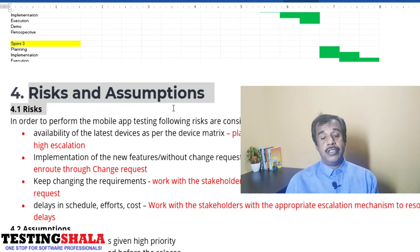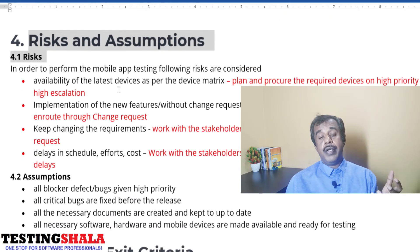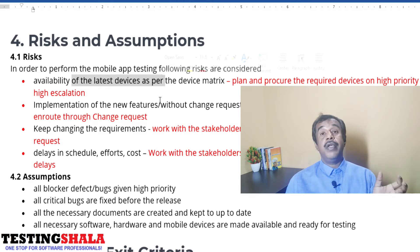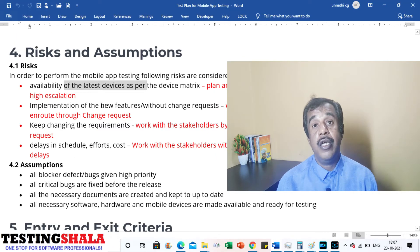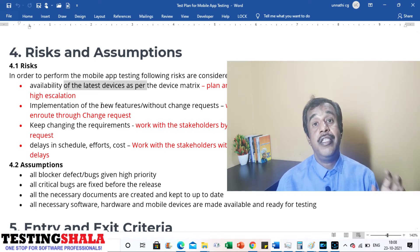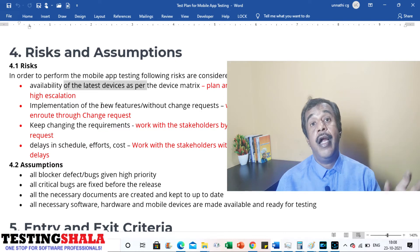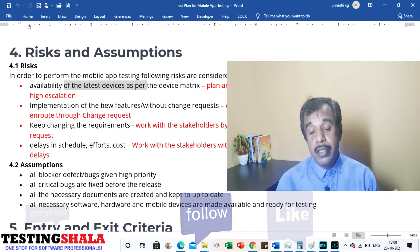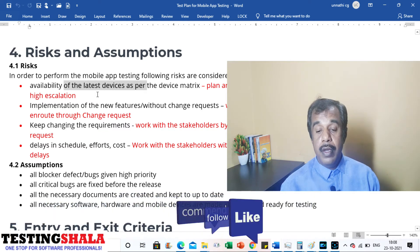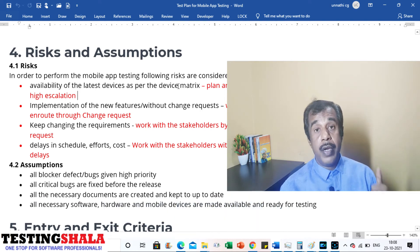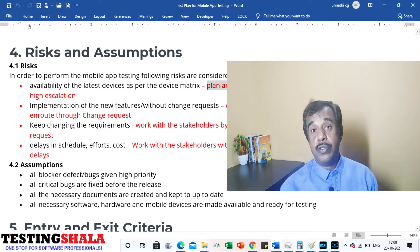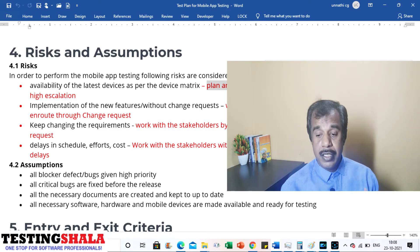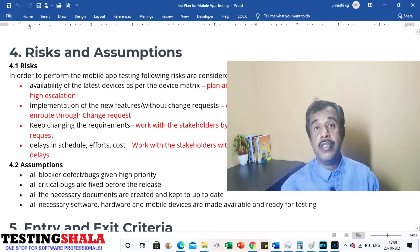Once estimation and schedule are done, we document risks and assumptions. A major risk in mobile app testing is availability of the latest devices. The test manager's job is to procure the latest devices available in the market. The mitigation plan is to plan procurement well in advance, and if things are not progressing, raise a priority escalation to get things done.